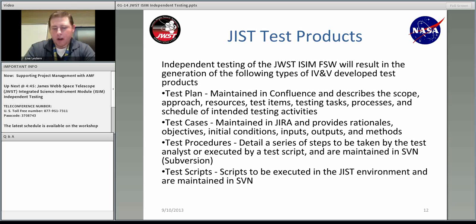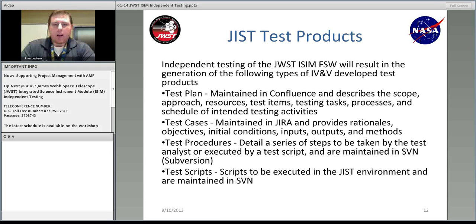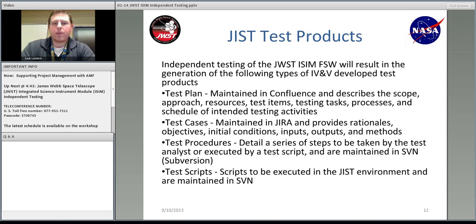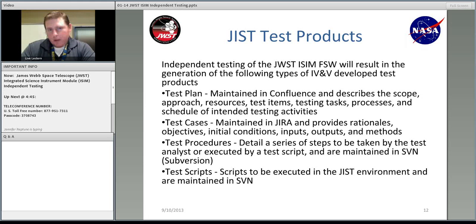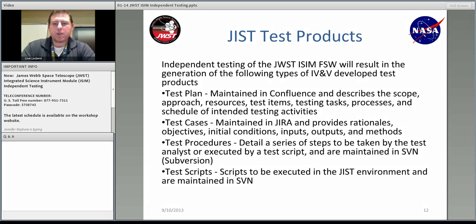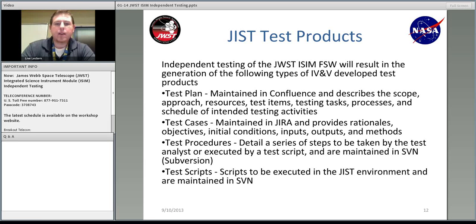When it comes to test products, these are the things we should be able to generate as part of this effort. First, the test plan, maintained in Confluence — a working portal we use here at IV&B — describing the scope, approach, resources, test items, testing tasks, processes, and schedule. Second, test cases, maintained in JIRA — a task management system — providing rationales, objectives, initial conditions, inputs, outputs, and methods. Third, test procedures, detailing a series of steps taken by the test analyst, maintained in SVN — subversion — which is a change control system. And finally, test scripts, which are executed in a GIST environment and also kept in SVN.